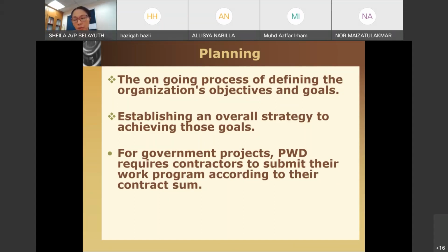Your current progress, how does it reflect ataupun compare with what you have actually planned for? If your baseline plan tu berubah, then you will never achieve the goal, sebab you keep changing it. But you need to have as-built planning. You need to see what you have actually achieved, compare balik dengan the baseline, and make strategic changes.